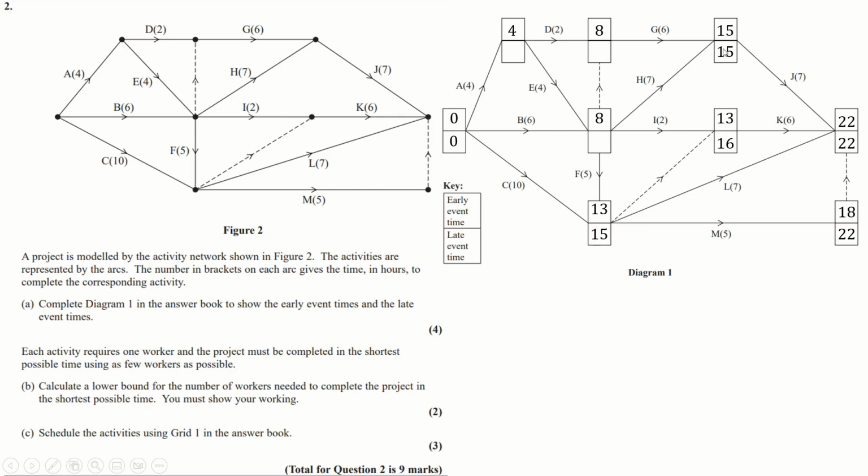And then, okay, again, minimal to get to here, is it going to be backwards through here? Well, that's actually the only way to do it, so we'll do that. And then backwards through here as well. Or, I guess you could go backwards through here. But 15 take away 7 is 8, which is minimal. And then keep going backwards here, so backwards through 4. 8 take 4 would give us 4, 9 take 2 gives us 7, so we'll go for a 4 here. And I think that's the whole thing filled out.